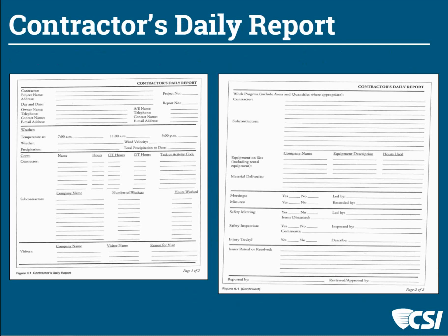Some contractors keep journals. Some construction companies require that. Some litigation is happy to see that pages can't be removed, or if they are, you know, there was something wrong. So they like to see bound daily reports. It doesn't matter what the form, as long as they're being done and that they're done accurately.